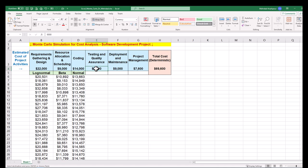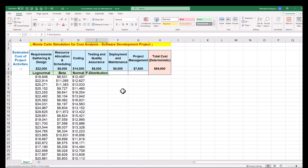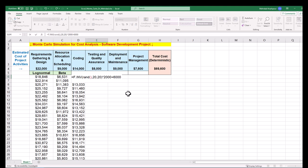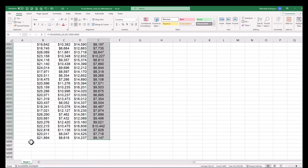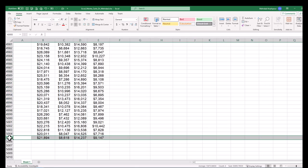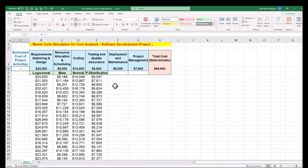The fourth project activity of testing and quality assurance has a single point estimated cost of $8,000. The best fitting distribution based on historical data is F-distribution or Fisher. We can generate random inputs by using the F-inverse function, then click and drag down to generate 5000 random numbers. The large number of cost samples offsets the effect of outliers or extreme cases for activities.